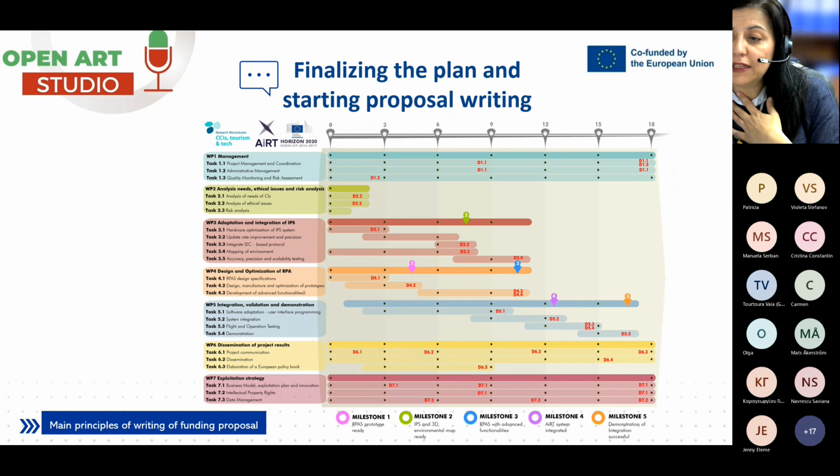And of course, as a last step before the project writing, give your plan a time frame. For this, we recommend making a so-called Gantt chart. So do not be afraid. In essence, it is a table where the first column presents the project activities, while the top row is for the time units. The cells in between are highlighted or somehow marked according to when a specific activity happens in the project. Why create this Gantt chart? It shows you the duration of the project activities, and lets you check that some activities might not have enough time, some activities can overlap, and whether there is extra capacity for additional activities.